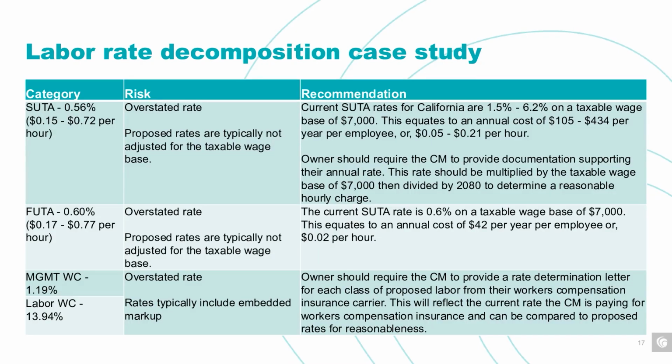Workers' compensation, again, what we're looking for on workers' compensation is to look at the actual cost support for it. Again, we saw a differentiation here between the management employees and the labor employees. And now what we need to actually see is what that contractor's actual rates are. So again, they should be able to provide you a rate determination letter that shows the actual rates they're paying for the different classes of labor.